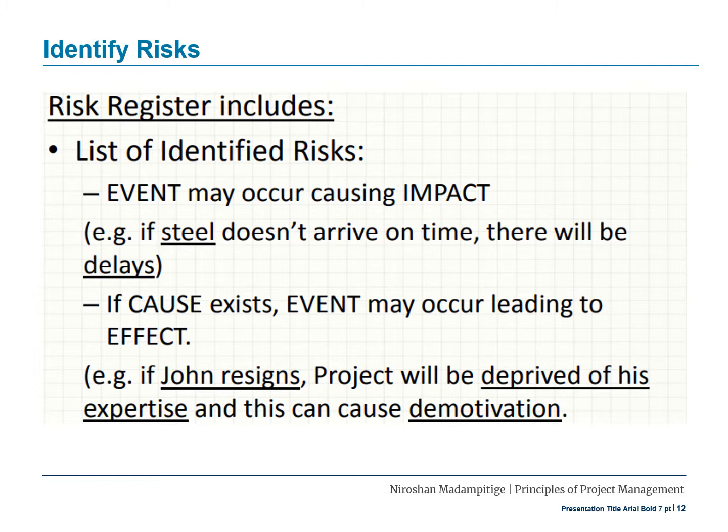Also, if anything is caused by any activity that happens, you will try to find out the cause. If the cause exists, an event may occur leading to an effect. Example, if John resigns, the project will be badly affected because of his expertise, and this can cause demotivation.